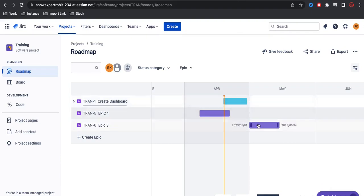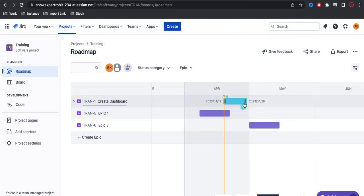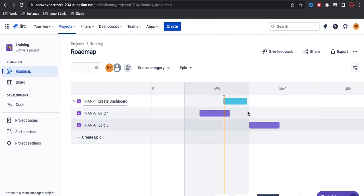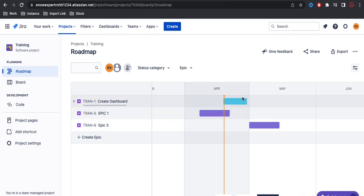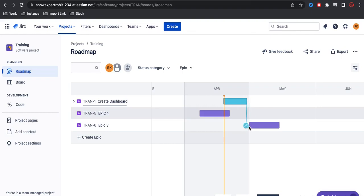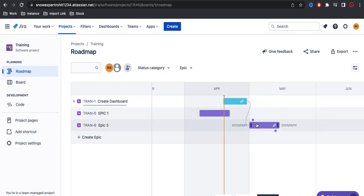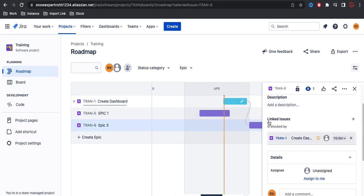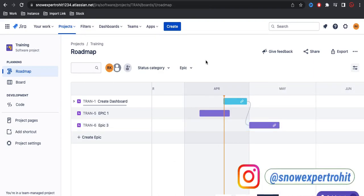Let's say we have three epics and one epic is dependent on another. Once the first epic is done then the second epic will start. If the first is still in progress, we can't work on the dependent epic. For that, when you hover over an epic you have a link option — you can drag to the other epic to create a dependency. It will show 'view dependency details' and under options you can see 'blocked by' and the other epic name.